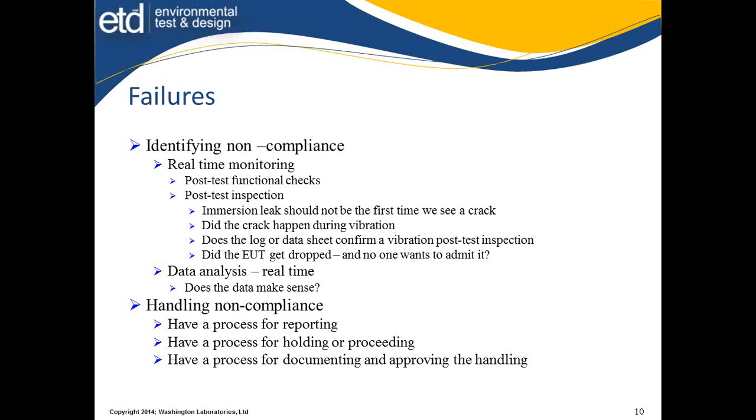There should be identified people in the program to contact. They need to be able to make the decision, and you need to let them know that things are holding pending that. They shouldn't be saying, well, you reported it, but you went on, I guess. That communication needs to be clear. Who's doing what? What are we going to do next? How are we proceeding? Document those things. Have that going ahead of time.